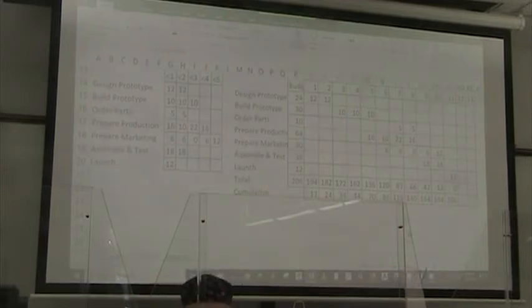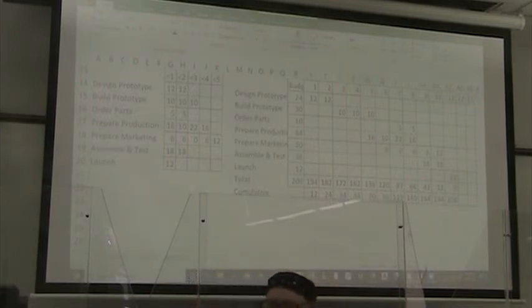And in that case, yes, 0 would be at the end, and the cumulative would be that I've spent the entire total budget. Okay, so what if it's not 0? What if 0 comes way before the end? Does that mean you've spent more? Yes, that would seem to indicate that you've already spent all of your budget.